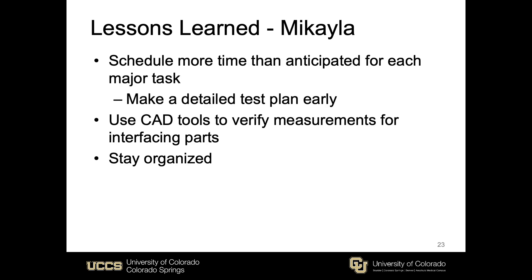Here are some of my lessons learned. We were really off with the timing of this project — we ended up starting testing way later than we should have, due in part to not having a good enough test plan in time and also the machine not being ready for testing by the date we needed. When we originally built the machine, I was in charge of electrical wiring and just used wires from the lab, not realizing they wouldn't carry enough current to power the motors properly. I should do early-stage testing rather than waiting until integration testing. This project was a lot bigger than expected and took more organization skills than anticipated — better communication and organization of our resources probably would have helped.